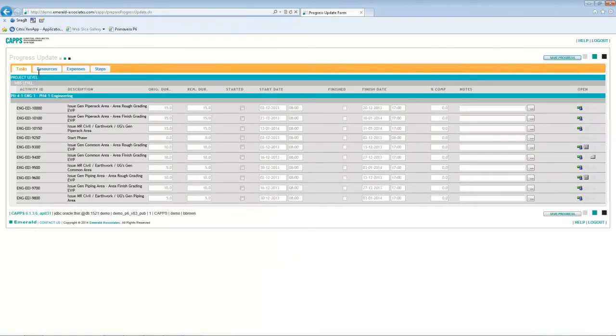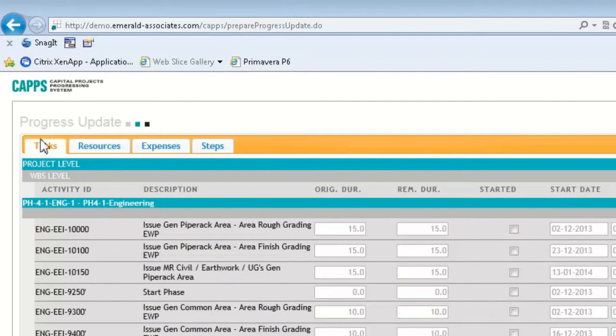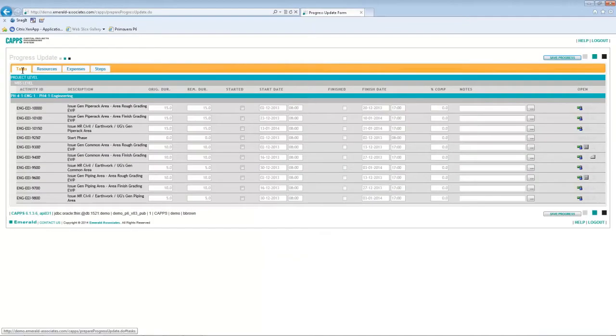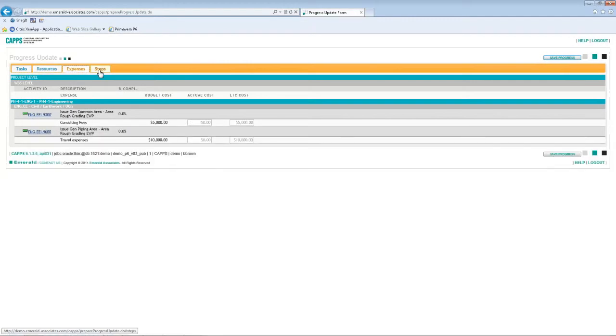The form is quite simple to use. You can see there are four major tabs, four major sections, each one designed for updating specific data area in P6: Tasks, resources, expenses, and steps.